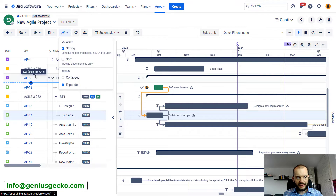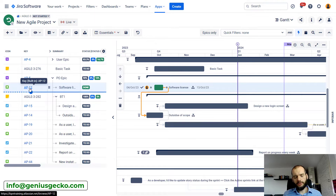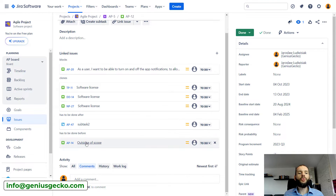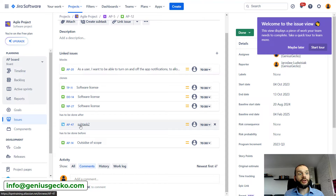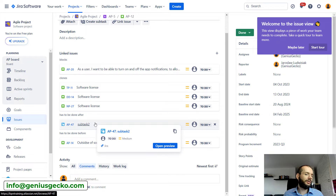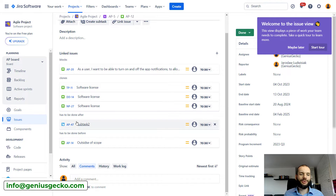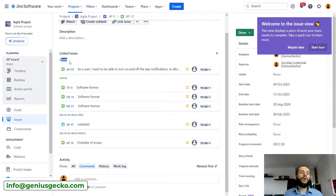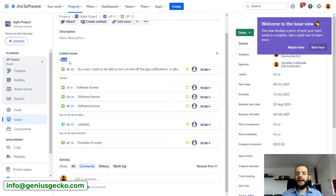Both categories of dependencies are also reflected in Jira at the task level. For example, task AP12 — if we enter there, we would see that this task has links that represent those dependencies. The moment we create a link, either one of the four link types representing strong dependency — 'has to be done after,' 'has to be before,' 'has to be done before,' 'has to be started together with,' and 'has to be ended together with' — will result in a strong dependency on the Gantt chart. The 'blocks' link type will be represented as a soft dependency. These are the default settings.